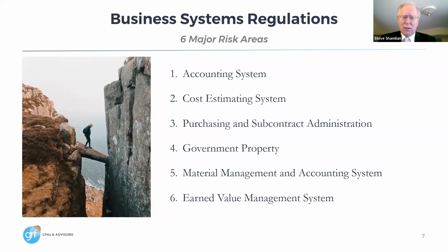Earned value management system. Earned value was developed by a contractor, and it's to monitor the process of big, complicated production jobs. I don't think the government fully understands the benefits from this. They, at least at one time, mandated its use for cost type contracting, and that just doesn't make any sense. It's better used for fixed price contracts of big, complicated production jobs. Next, please.